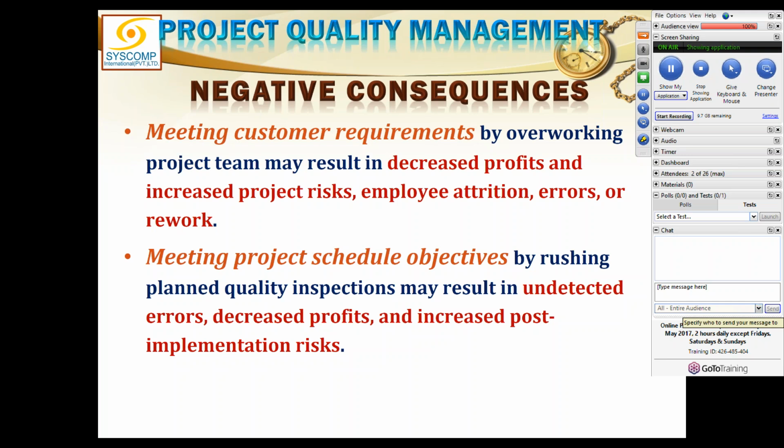I'll give you the example of Nadra when we were actually data entering the whole population of Pakistan in the previous census. This problem happened. You see, it is always the pressure of time which is imposed on you, and no matter how efficiently you plan things, there is always a pressure from the top. So that was the time when we planned the whole thing because that was a huge data for each citizen of Pakistan. At least there were 5 or 6 pages of data that had to be entered for the whole population of Pakistan, and therefore we planned the whole thing to be done in 3 years.